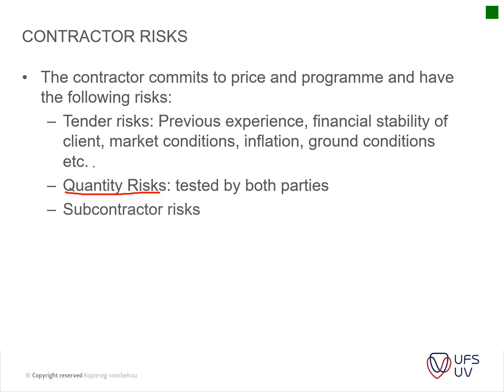And then you have subcontractor risks, guys not producing. And then obviously you have design risks. If the designers didn't look at everything, you may argue that it goes back to the designers, but it still stays a risk for the contractor, because if there was a design mistake, the contractor might still be influenced. For instance, the work has to stop while a design is fixed, so that's where your time is. RFIs and information requests are very important.